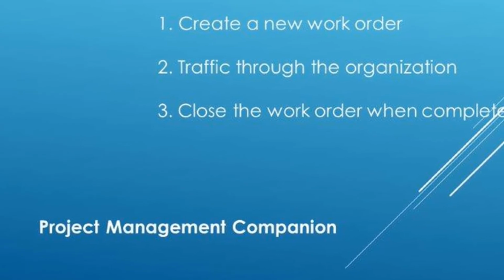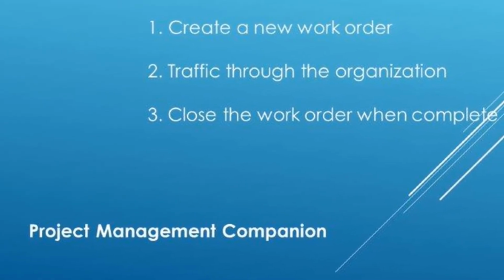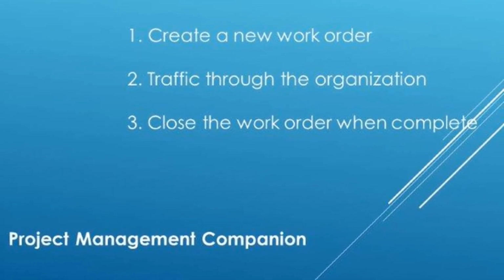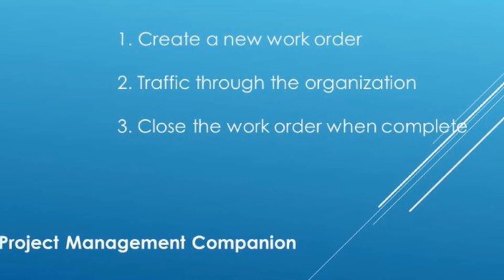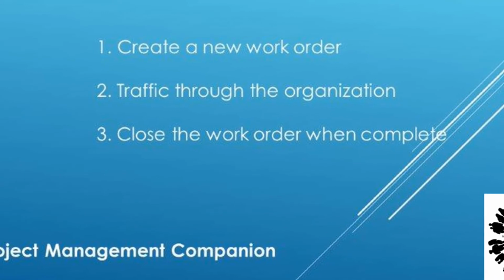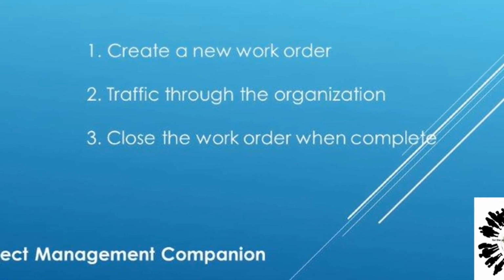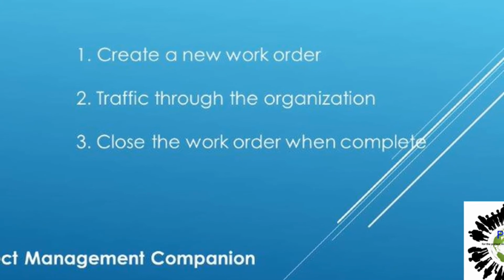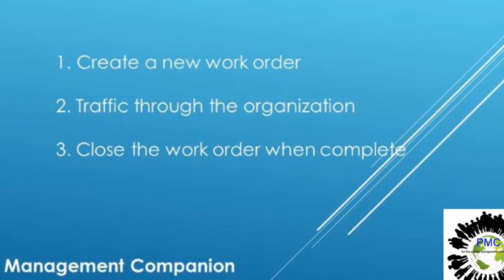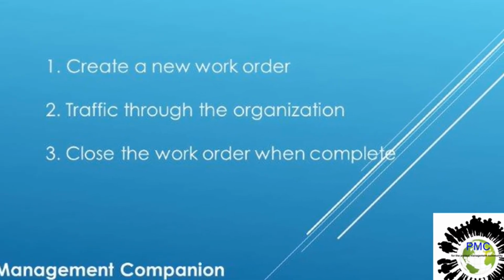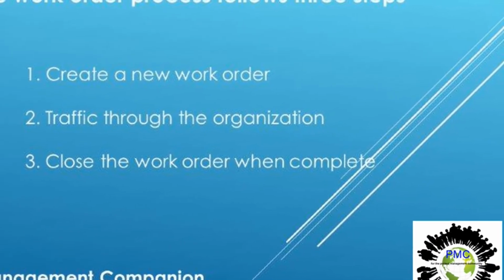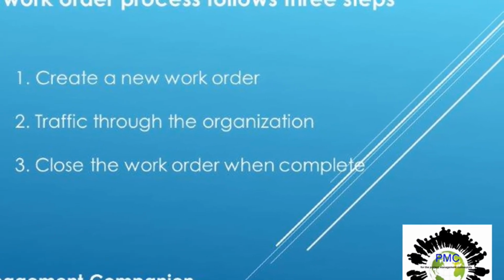1. Create a new work order. 2. Traffic through the organization. 3. Close the work order when complete. In terms of those who are involved in work order management, they include the person who requested the work, the individual who is authorized to approve it, and those who carry it out. Having some reporting mechanism will also help to keep track of the work and make sure that it's finished by the deadline. When finished, payment is required, and so payroll needs to be involved to manage any down payments and then final pay. Project software can help organize work and drive efficiency.